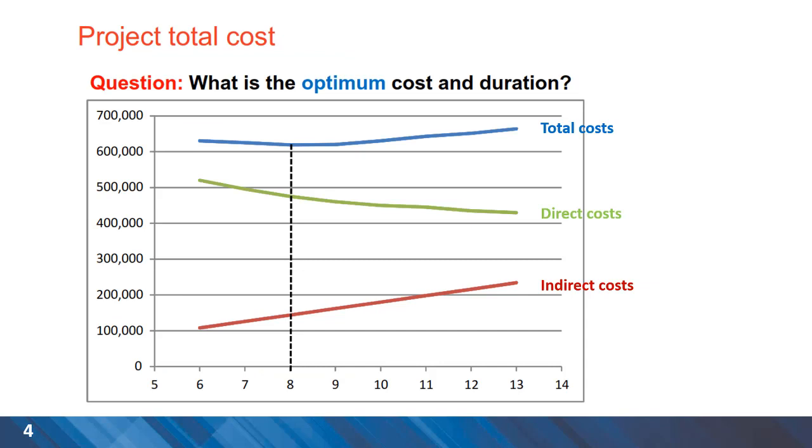Then project direct costs and indirect costs can be plotted and the sum of the two will be the total cost of the project. Obviously we are after minimum total cost for the project which shows us the optimum duration as well.